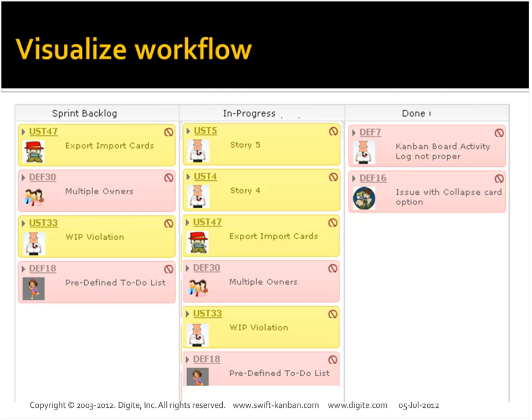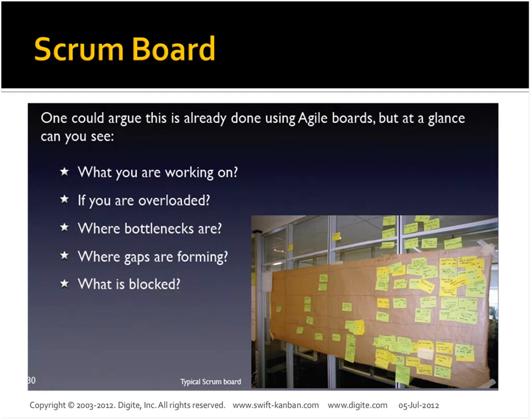Once you go further, some would say that a Scrum Board also focuses on that, but typically the key distinction is that a Scrum Board has more focus on the actual development task and not on the story at a high level. So you would always be focusing on a very granular task and saying, these are the 3 tasks which are pending, and I need to finish them up. But the overall picture at times gets missing.